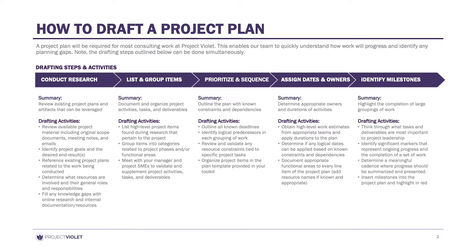Finally, highlight key milestones. The end of each section in our templates usually signifies a milestone, and you can definitely start with that. Keep in mind this step is actually very important, because milestones are usually what is rolled up into a status report, so progress can be gauged and more quickly reviewed without going through a detailed project plan repeatedly.